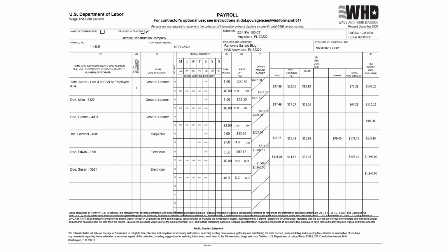So in Block 1, you would list each worker's name, and only the laborers or mechanics performing construction work under the contract should be listed. Please note that business owners only need to include their name, work classification, including the term owner, and the daily total hours worked. You would specify the job classification, which you get off the wage determination, and corresponding job title.